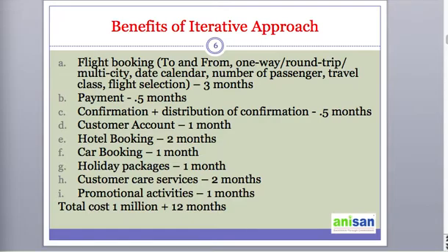This is the most important factor, because otherwise, say the team receives a project that is to be delivered after 24 months, what happens in that case? For the first 2 or 3 months nobody wants to work, because they will think, oh, the delivery is after 24 months, right? And then towards the end there will be a huge rush, right? In order to keep that momentum, and also the deliverables on an ongoing basis, this iterative and incremental approach works well.